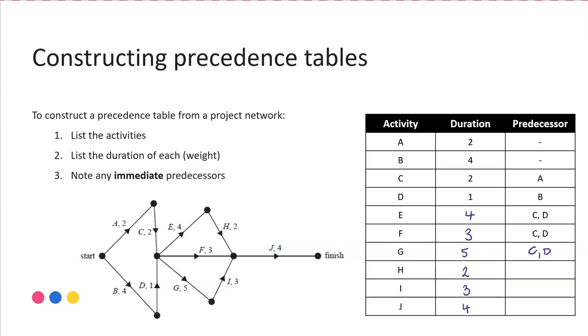If we now look at H, we can see for activity H, E ends just prior, so E is our predecessor for H. For activity I, we can see G is the predecessor. And then finally for activity J, we have H, F, and I all coming into finish at that vertex where J commences. So F, H, and I, normally we would put those in alphabetical order, but it's not a requirement as long as the correct activities are listed.